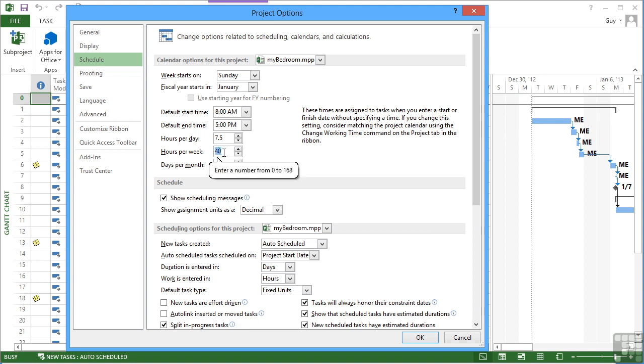How many days in a month? So if we enter Mo, so 1Mo, 2Mo's, it converts that into a number of days, in this case 20, and then it will convert that 20 into hours by doing 20 times 7.5.